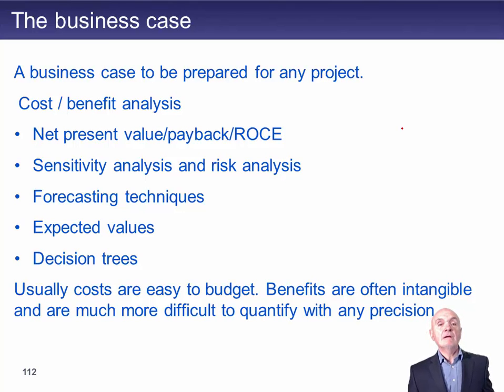We know that there are inferior ways of doing project appraisal. Payback and return on capital employed are simpler, but they don't take into account the fact, which is present in projects, that you tend to spend money now and you don't get the benefit maybe for 3, 5, 10 years in the future. That's why the discounted cash flow, of which net present value is one technique, is better.